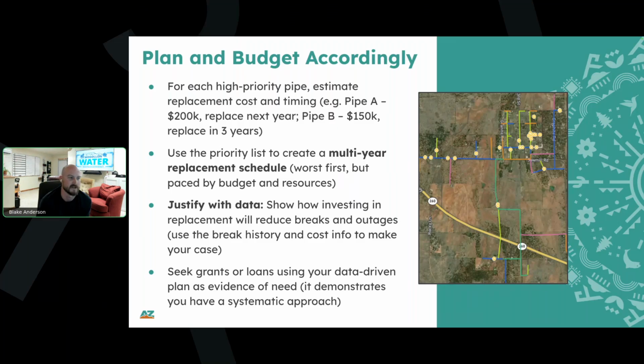And so they want to put away 10 to 15% every year, but they aren't thinking about the fact that this is such an asset heavy business that they should be factoring in the total cost of all of their assets and then depreciating that over time and building it into their budget. And so if you have 10,000 feet of pipe in the ground, it's $100 a foot, it lasts 50 years, you can use that same math to start to build those things into your budget.